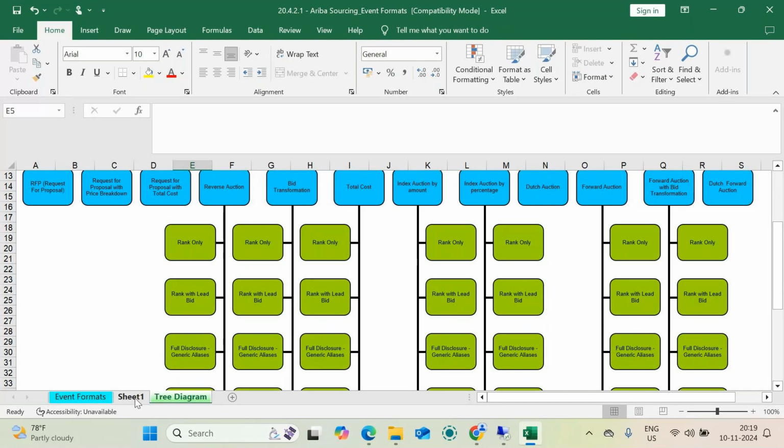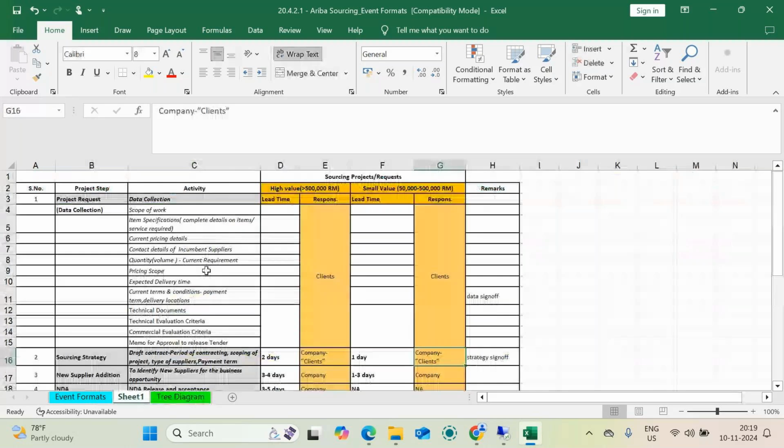Now, how are you going to collect the data for any auction, how are you going to approach your client, and for which value are you going to do the auction? These are the important things. Because you are going to discuss with the client, the client will come and say, I want to do an electricity bill auction. Are you going to do that? No, because we don't have fair suppliers to pay, we have only one electricity department that dispatches, we get the service from that department. So we cannot do an auction for electricity.